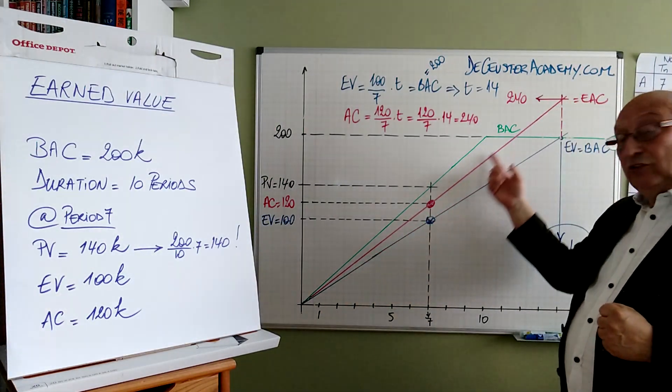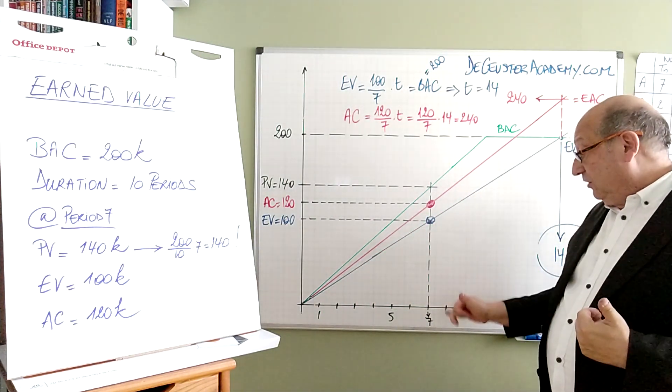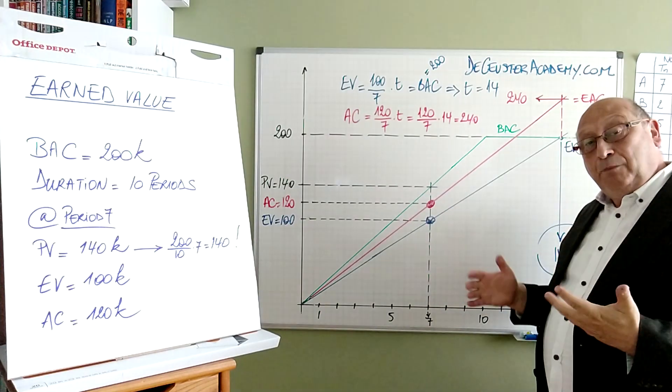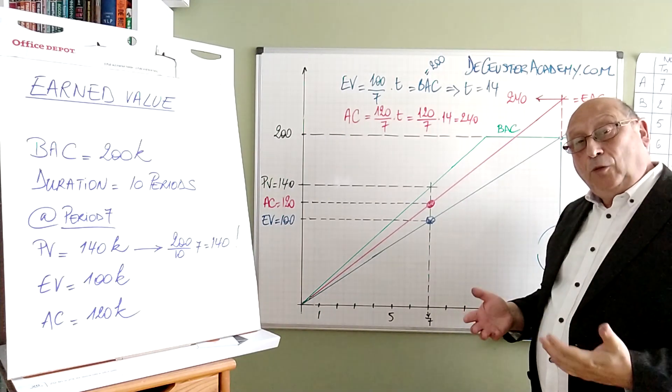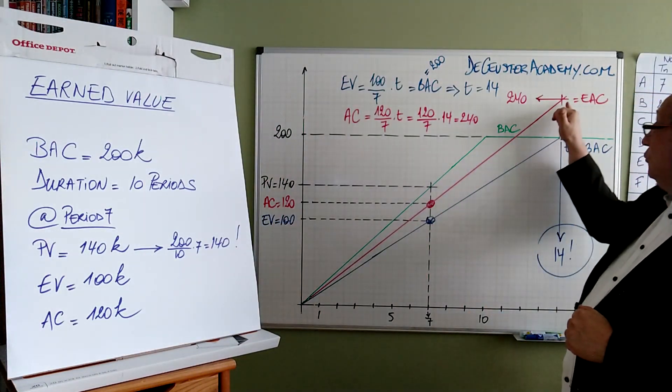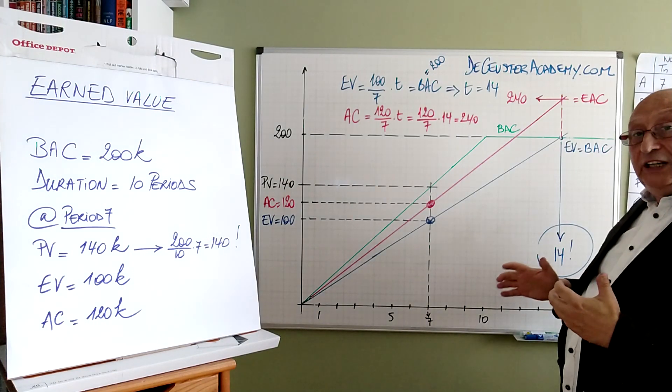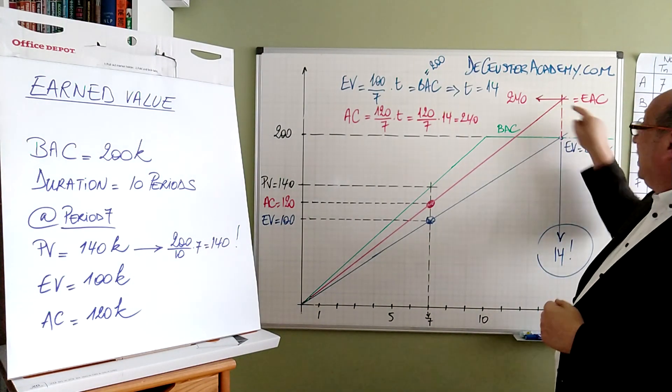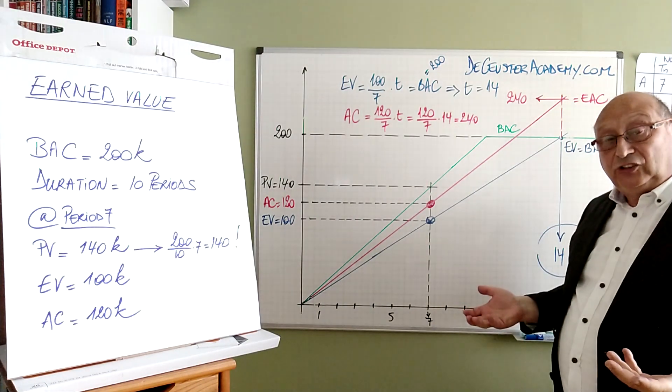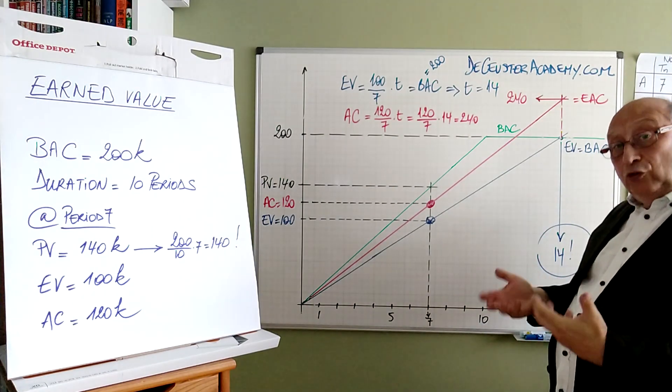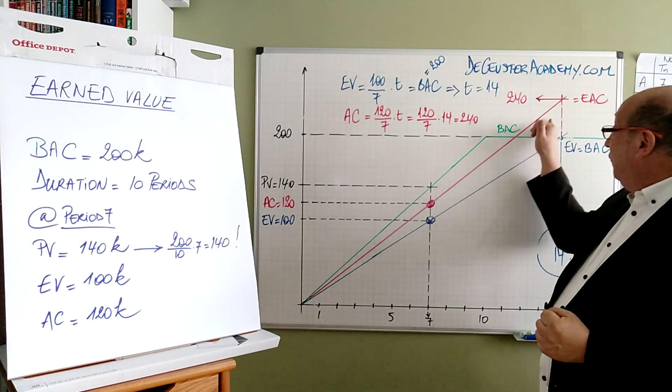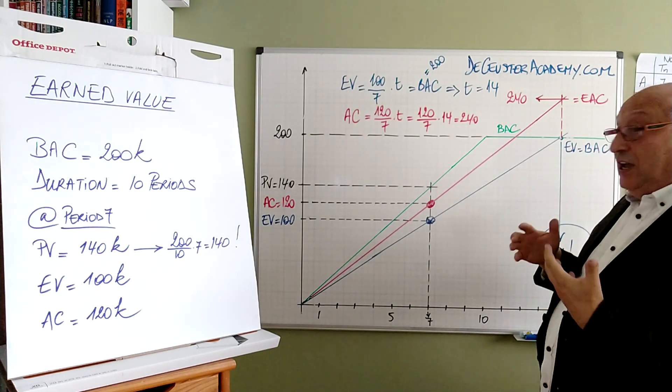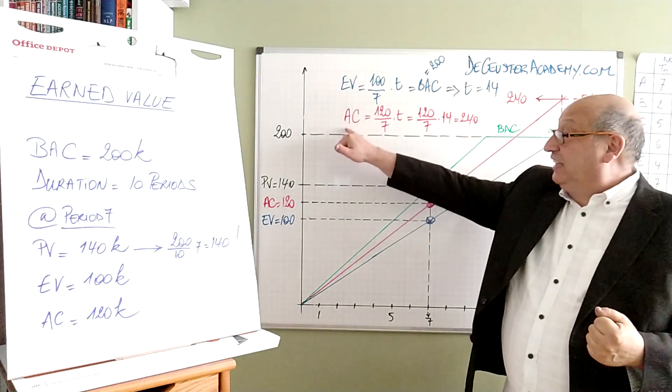Now we apply the same principle to the actual cost. We extrapolate the actual cost starting from period 7. We use the same slope, the same proportion, and we continue working on the project until we reach the 14 periods. So we continue spending money at the same proportion as before. And what we find out is what we can write as an equation.